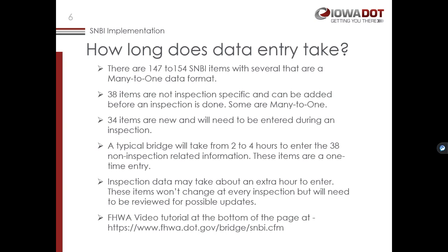So a typical bridge can take 2 to 4 hours to enter those new 38 items, the non-inspection items, because you have to pull up plans and look at plans and pull information off of that, and it just takes a little time. You've got to look at the coding guide and see what codes you need to use, and it's just not a real quick process. So be aware of that extra time that's going to need to be taken.